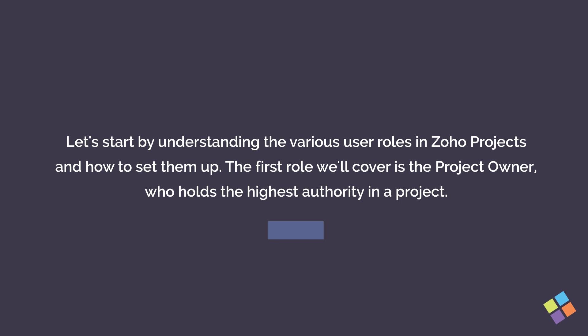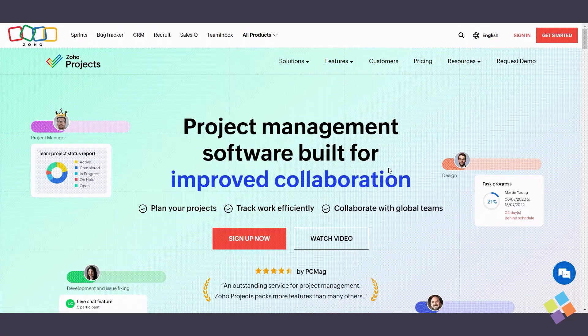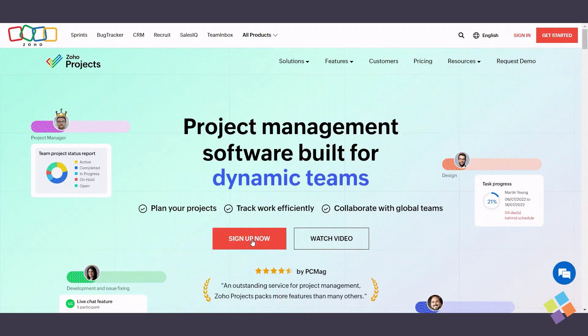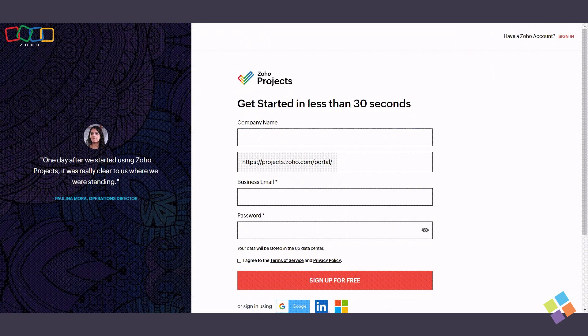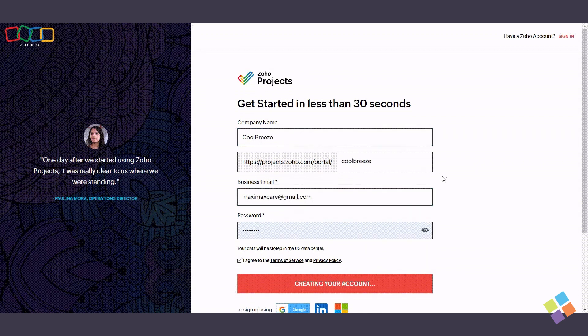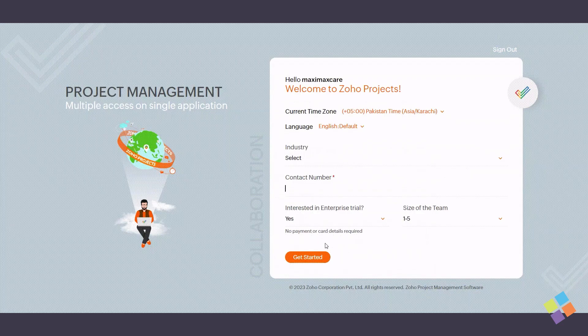The first role we'll cover is the project owner, who holds the highest authority in a project. To set up a project owner role, access your Zoho Projects account or create a new one on the official Zoho Projects website. Fill in your company name, business email, and password, and click Sign Up for Free.